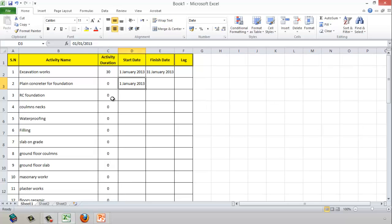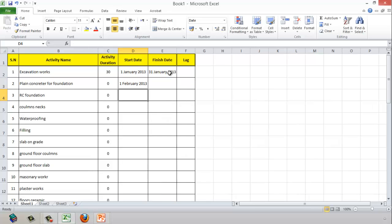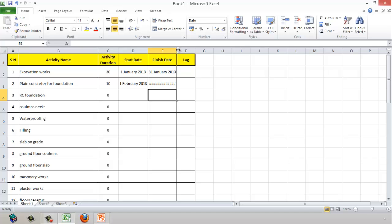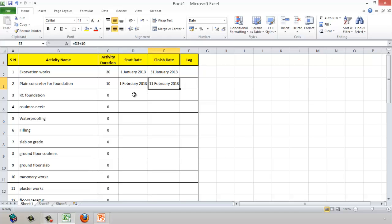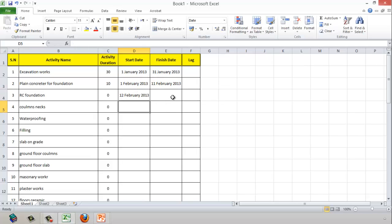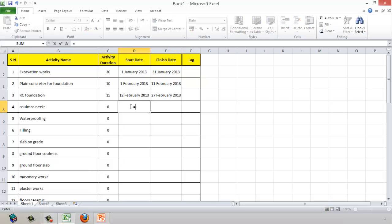Plain concrete will start after the completion date of the excavation. Let's say plain concrete takes 10 days — here is the finish date. RC concrete starts after plain concrete and takes 15 days. Column necks start after RC concrete and take 10 days.